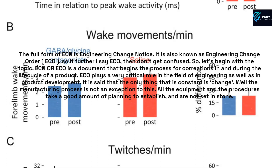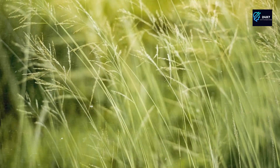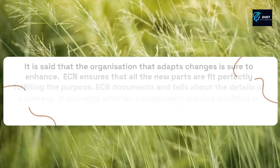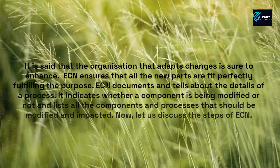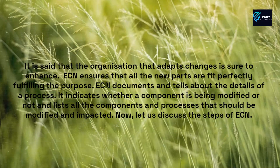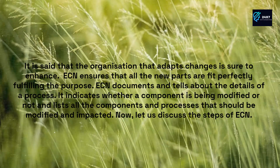It is said that the only thing that is constant is change, and the manufacturing process is not an exception to this. All the equipment and the procedures take a good amount of planning to establish and are not set in stone. It is said that the organization that adapts changes is sure to enhance. ECN ensures that all the new parts fit perfectly, fulfilling the purpose. ECN documents and tells about the details of a process. It indicates whether a component is being modified or not and lists all the components and processes that should be modified and impacted.